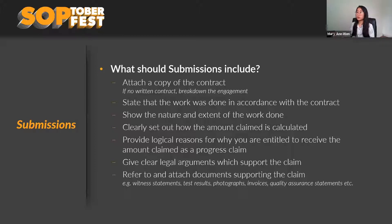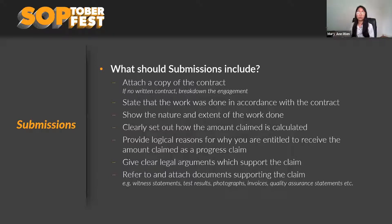Now touching on what your submissions should include. There's no set rule, but here's guidance on what we would include. Under section 7 of the Act, it applies to a construction contract whether written, oral, partly written, or partly oral. If you have a written contract, enclose it. If you don't have a written contract, break down the engagement — probably in a witness statement explaining how the engagement took place. You need to state the works were done in accordance with the contract and show the nature and extent of the work done.